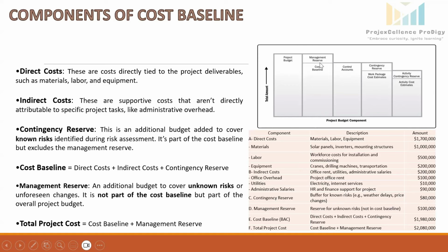Another factor is the management reserve. Management reserve is an additional budget to cover unknown risks or unforeseen changes. It is not part of the cost baseline, but part of the overall project budget. So here in our project, the reserve for unknown risk is not included in the cost baseline. We took the cost of this management reserve as 100K.